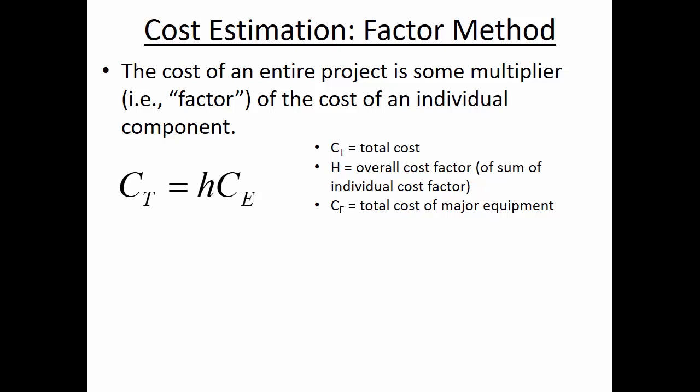The same thing holds true for construction of new homes, for instance. A rule of thumb that a lot of people use is for a used home, maybe you should expect to spend about $100 a square foot. In a lot of markets, that just happens to be the case, that if you know one thing about it, you can project the entire price based on that one constituent.